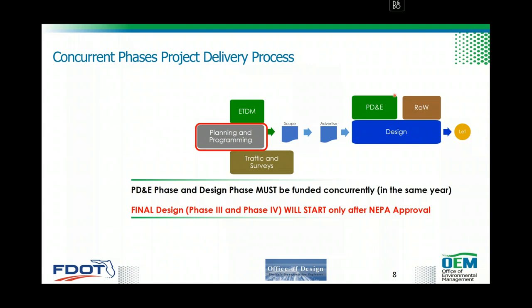Also, the caveat of that, which is a big requirement I'm going to be emphasizing later, is that the final design activities, which is the preparation of phase 3 and phase 4 design plans, will not start until NEPA is cleared.